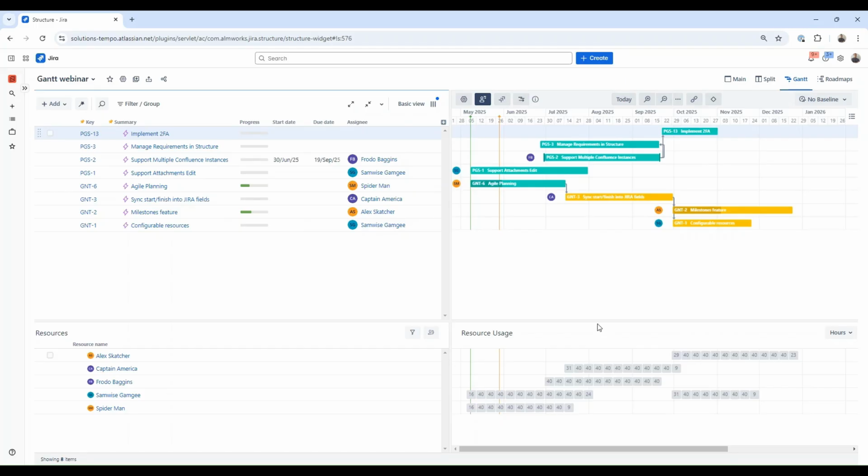It shows work allocations across each task we have on the chart. It is based on work estimations we set in our configuration and also on the Gantt resource calendar, which defines how much time a resource can spend working on these tasks. The default value is 40 hours per week. So if we schedule for the same resource several tasks within the same timeline, this resource will be over-allocated because he would need then more than 8 hours per day to work on these tasks. And this over-allocation will be shown in red.